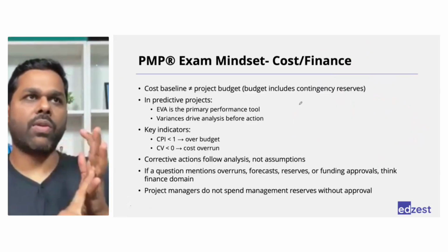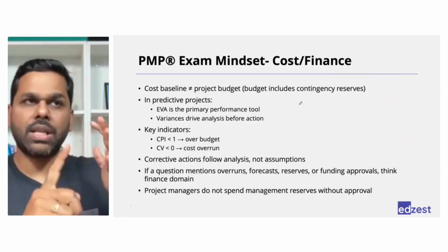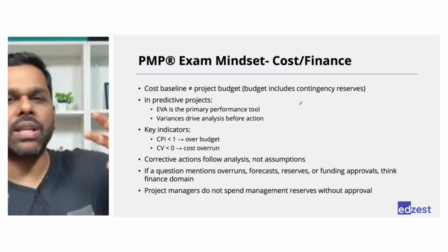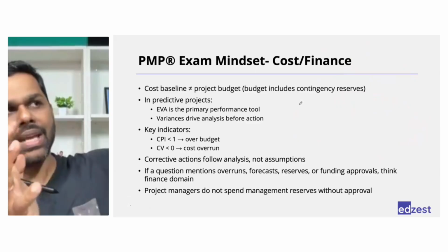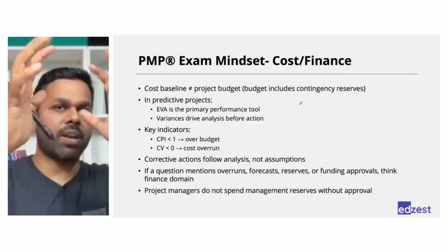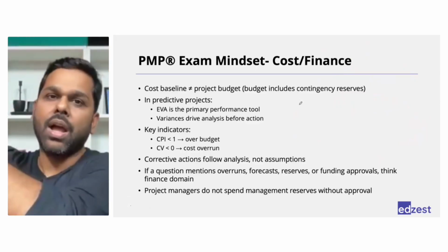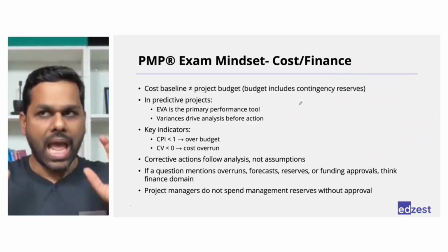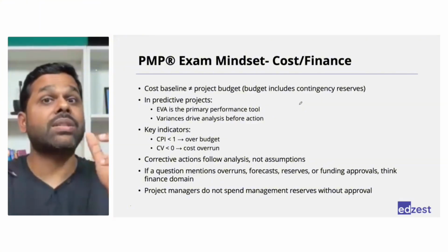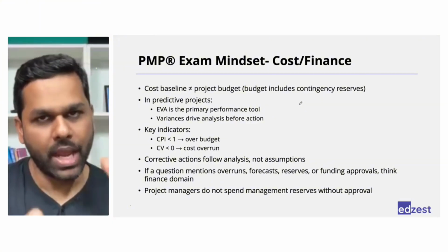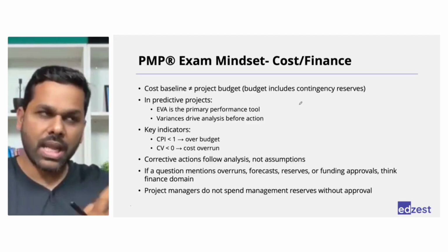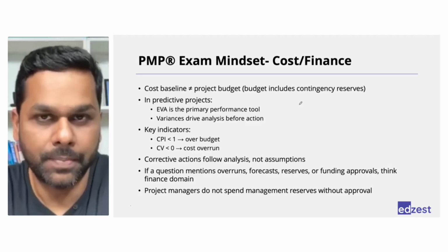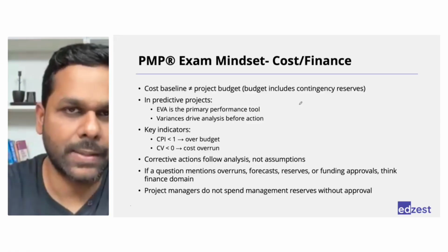See, quality requirements, compliance requirements, safety requirements, you capture all those requirements, right? At that point of time, you are not thinking about which requirement is which. Then you summarize: these are my quality requirements, these are my communication requirements, these are my safety requirements, these are my privacy requirements. You can put them into different buckets, and when you do that, you understand what your scope could be. So first you list down all the requirements, then you summarize them, and you try to understand what your scope statement would look like. Answer to your question is yes.